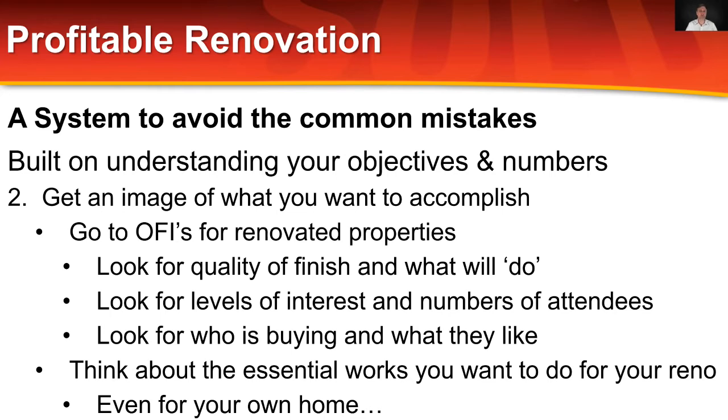Get an idea from the people who walk through what they go, wow, to. Go to open for inspections for rental properties as well as properties for sale, and see how they're renovated. A renovation for a rental is a very, very different renovation to that of something you're looking to sell. A renovation for a rental is a renovation that needs to be robust. It needs to be pretty much fire hydrant proof, so that when you walk through after one tenant, get the fire hydrant, wash all the walls down, the house down, it's robust and it can tolerate it. It's a solid investment, a solid renovation that holds up to scrutiny.